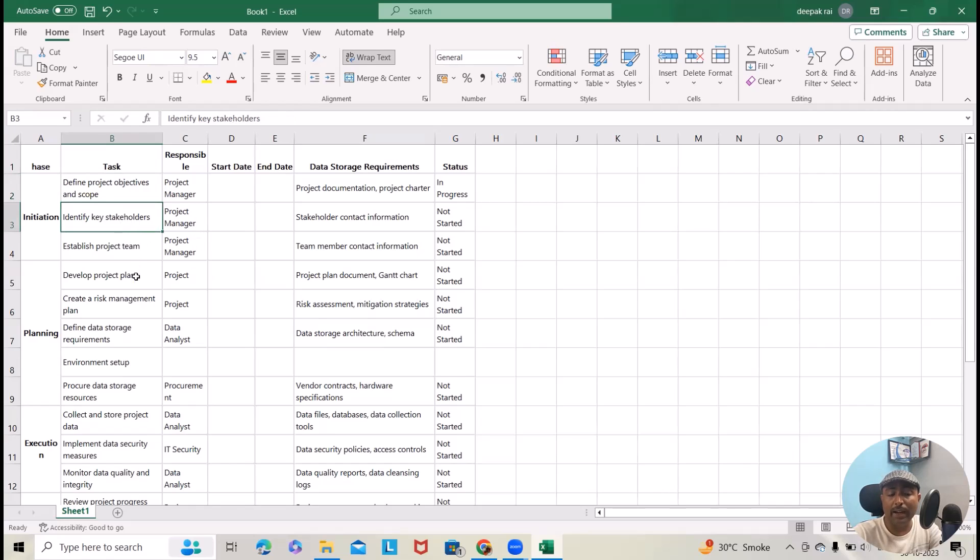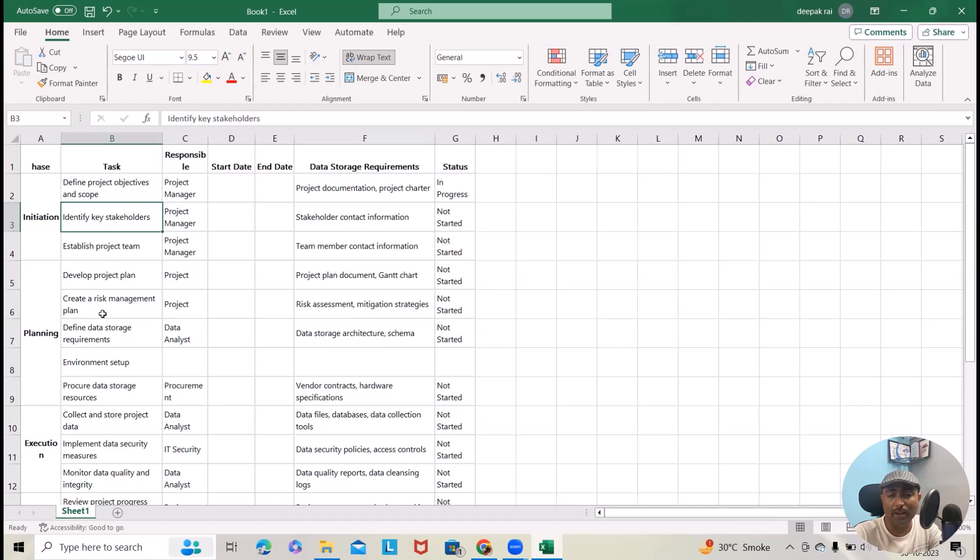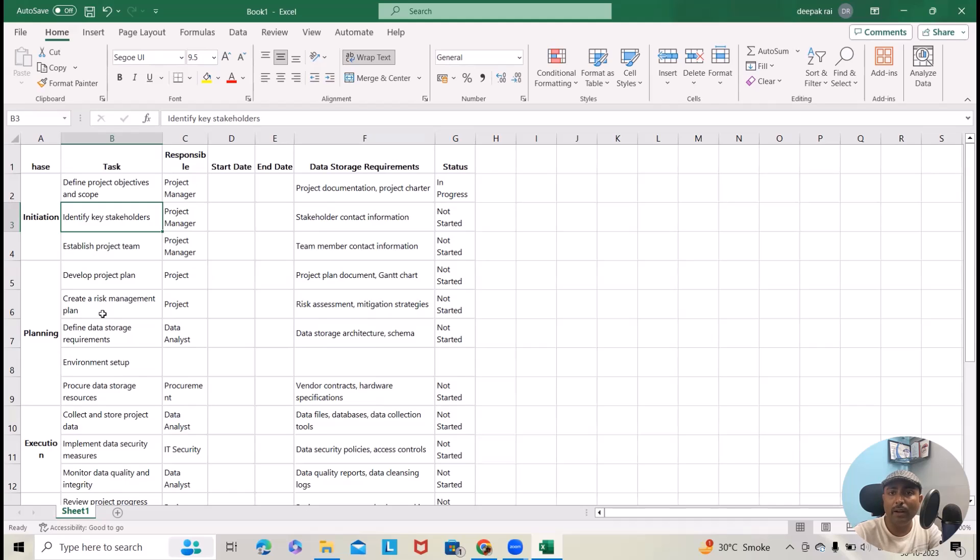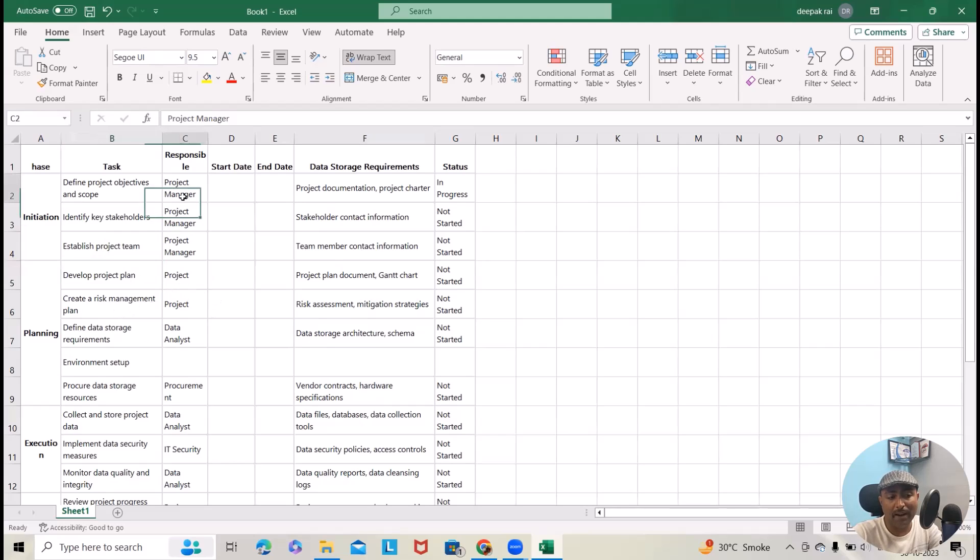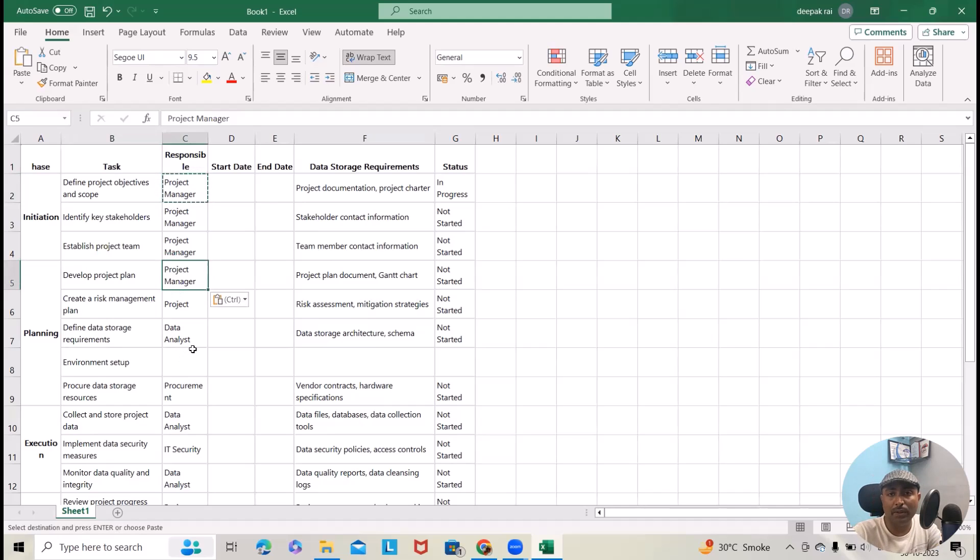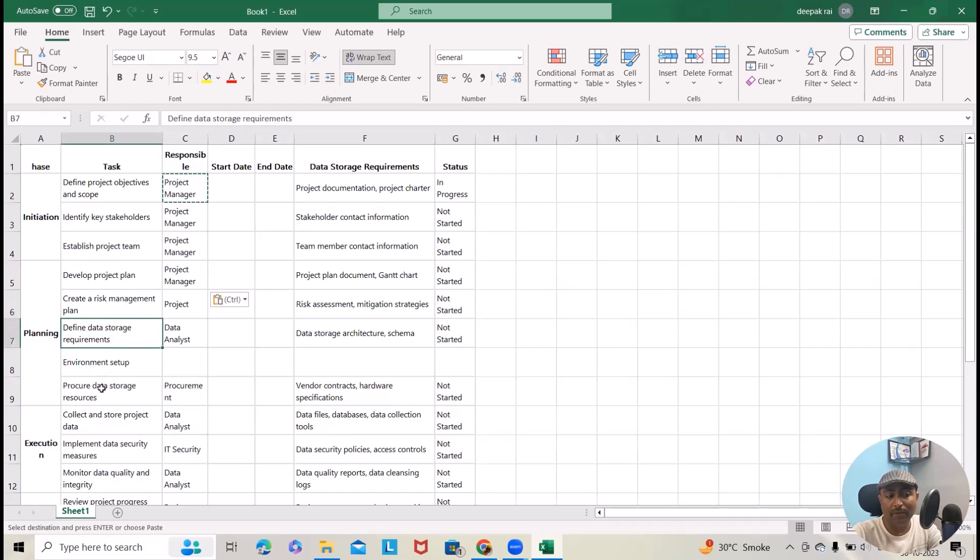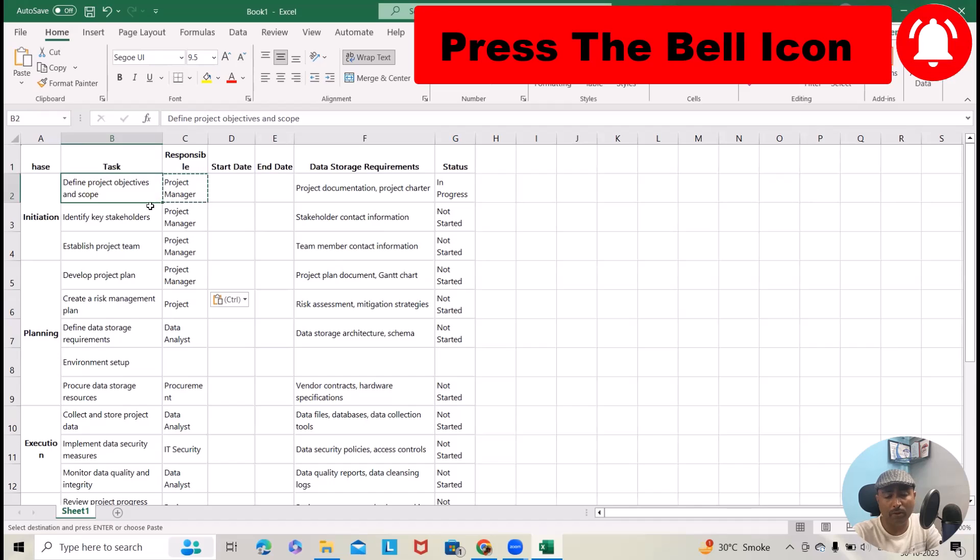Next, identifying the key stakeholders who are needed for this project. If this is related with the database, database developers will be required, then the database configuration manager or DBA person will be needed. Next is development team, UAT, and QA will always be there, IT and infosec team. If this project will be related with any user and data, definitely compliance team will be required in this project as well. Next is developing project plan. That project plan will also be done by the project manager with the help of the development lead as well as test lead, because project managers want the timeline from each of the team. Create a risk management plan, defining data storage requirements. To generate all those informations, you can take help of OpenAI.